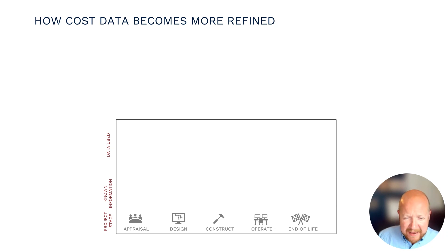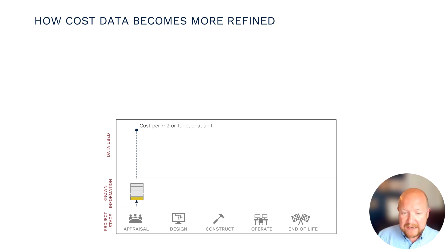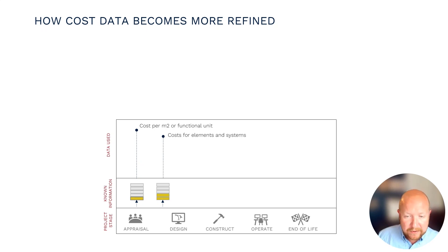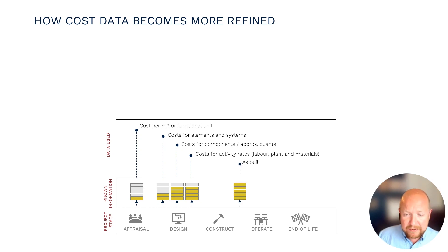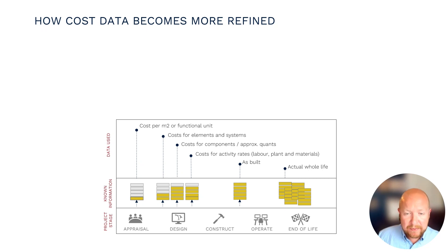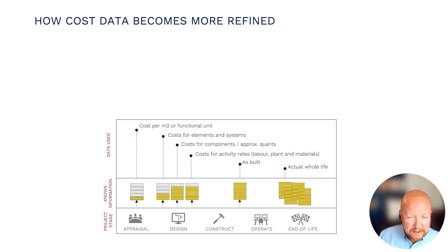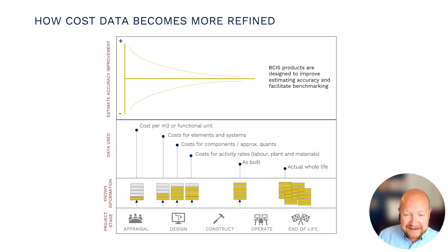Looking across the project stages from conception to design, building operation, maintenance, and ultimately end of life, the cost data we have clearly varies considerably. Those differences are largely due to the fact that at different points in time we know different things. At the appraisal stage we might know the building's size but very little about specification or operation. As we move through the stages, the information we have becomes more detailed and so does the cost data we need to input. It's only after the build is complete that we can have a proper understanding of what was actually used in the construction phase and any variations made to the plans.